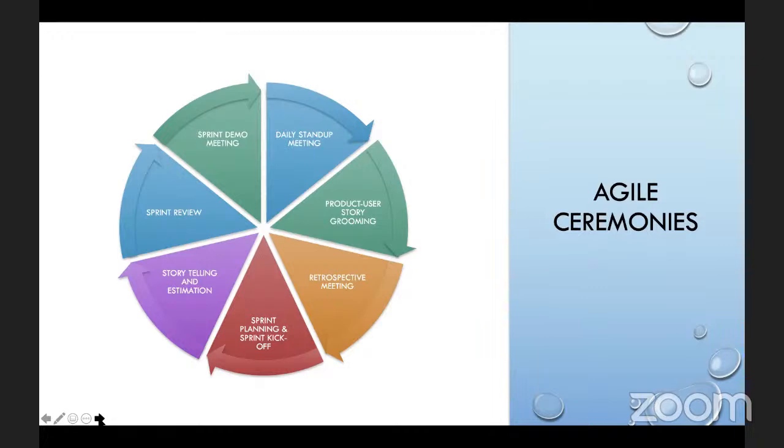And usually, statuses are from developers and QAs. These are the folks that will provide their statuses, because these are the guys that are working. They are developing and testing, and we want to make sure that if they have an issue, they have a problem, we can escalate and then resolve the issues for them in a timely fashion. Because if we delay them by a couple of hours, by a day, it will have some negative impact on our delivery schedule, right? Because we have 2 weeks to deliver, right? This feature says that we have prioritized.